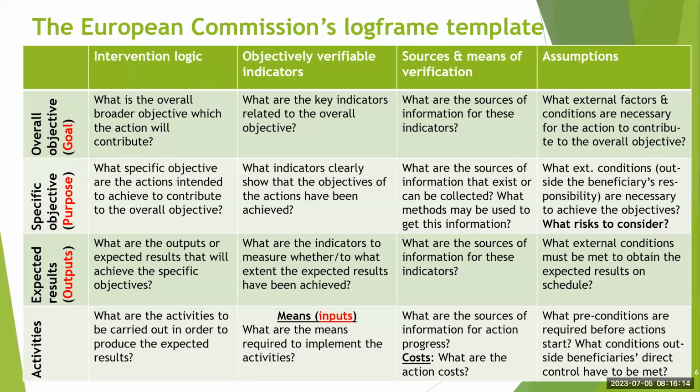So you want to demonstrate that after the actions have been taken, the purpose of the project delivered, there is going to be a contribution to a certain overall national development aspiration, which in this case is the overall goal. So when we look at this first column, that is the intervention logic, perhaps the most important in this exercise, we would want to be sure that we are not undertaking certain activities that are kind of haphazard, but rather specifically linked to what the project output is, what the project is intended to deliver.